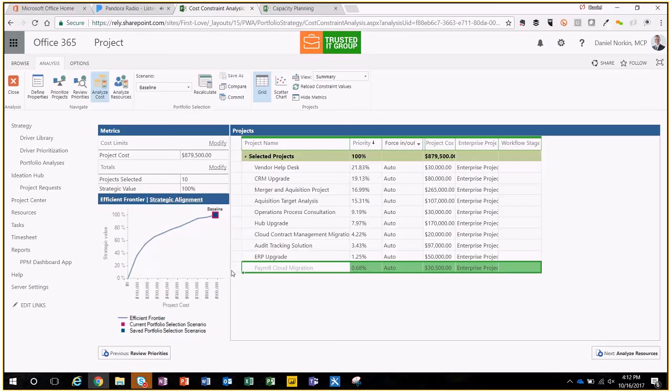But we just went through the entire driver prioritization. We know exactly what the portfolio needs to look like, and we basically did all the pre-planning. We figured out the project cost, and I'm coming into that. I'm like, all right, look at this. I got this. I could do 100% of your strategic portfolio if we go through with these 10 projects. Right, so these 10 projects equal 100% of the strategic value that you're looking for as per the pairwise comparison stuff that we were doing before. But I'm going to need $879,000.